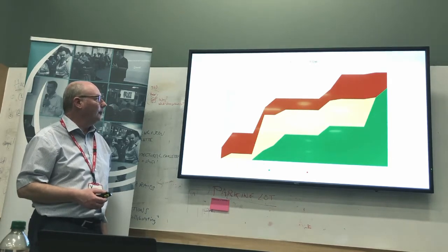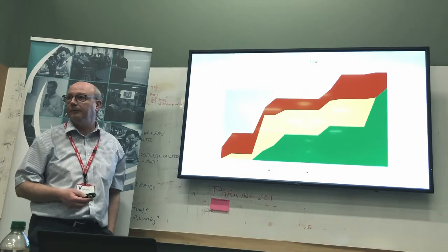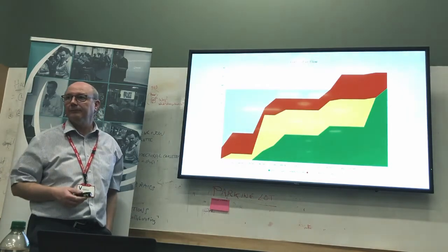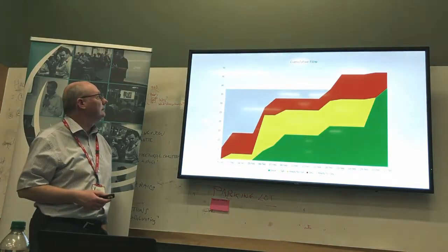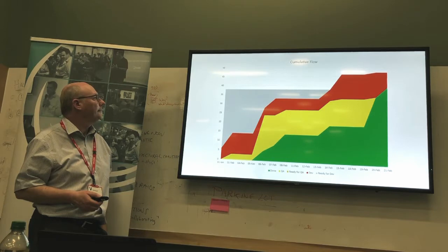I don't think there was much in the way of throwing stuff back to development on this sprint. It's got high rework because you started off at 38, yet you've got a lot more development than you started with. So basically things were thrown over the fence, and they came back and they had to do a lot more development work. So I imagine there's low quality in essence.